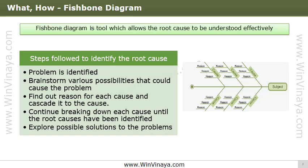Having categories will help you structure idea generation and get more relevant causes. Step three: for each cause, identify other specific factors which may be the reasons, and make these the labels of sub-branches. Step four: continue breaking down each cause until you reach a root cause. Step five: explore possible solutions to the problem.